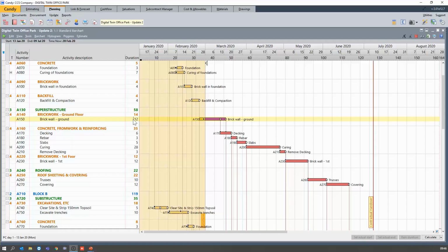And then the last option is to maybe introduce a weekend work calendar. So that means you introduce a second calendar, because currently this is a PC calendar, which allows for weekend work, and then allocate that calendar to one activity or various activities to try and make up for that time.